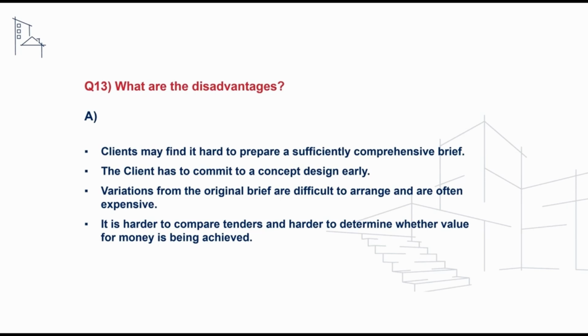There may also be a risk premium to pay under design and build procurement, as the employer is transferring both construction and design responsibility away to the main contractor.